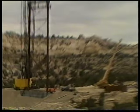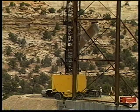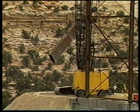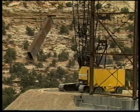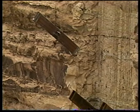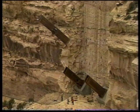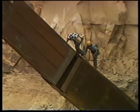Note that number 1 ribs were freestanding when set, and the forestay line started with the number 2 ribs. A tugger mounted at the base of the tower and a snatch block mounted on the high end of the rib being erected were used to pull out each forestay line so it could be hooked to the rib tie-off lug. Once attached, the forestay line was tensioned to a pre-calculated value using the grip hoist tensioning system at the